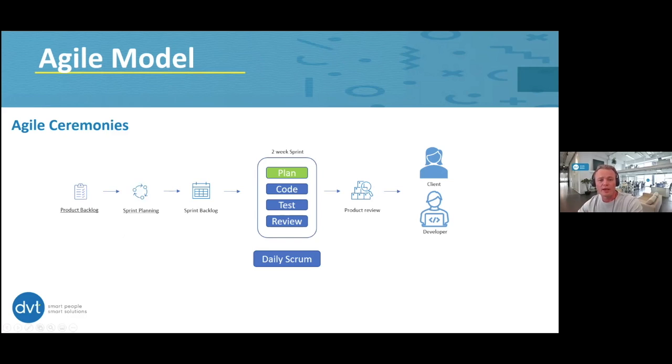The sprint planning breaks down the work that the team can take on in a sprint. This may include multiple sprints, and the developers capture further technical information on tasks and size each of these work items. The sprint backlog is where the team identifies the backlog or work items that they can commit to, and ideally, these should be delivered at the end of the sprint.